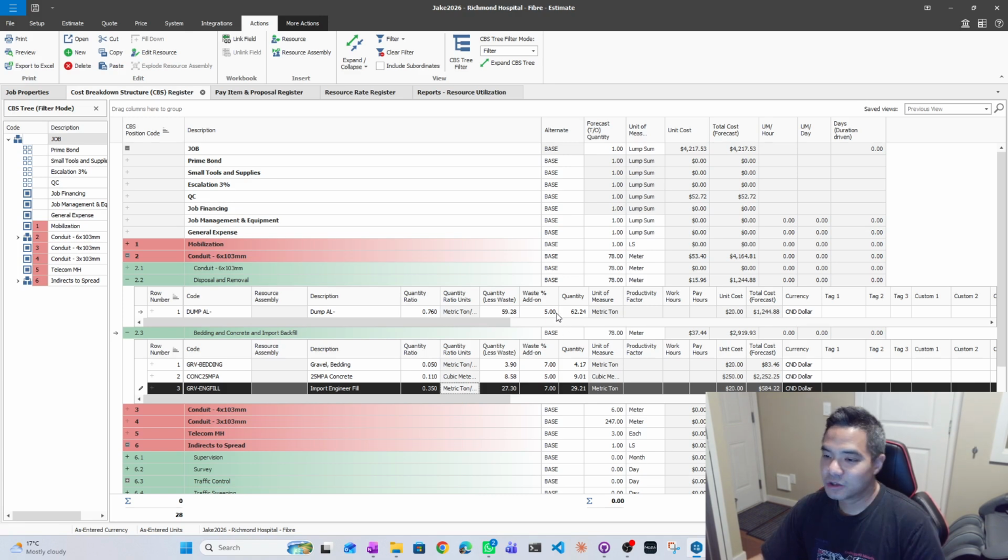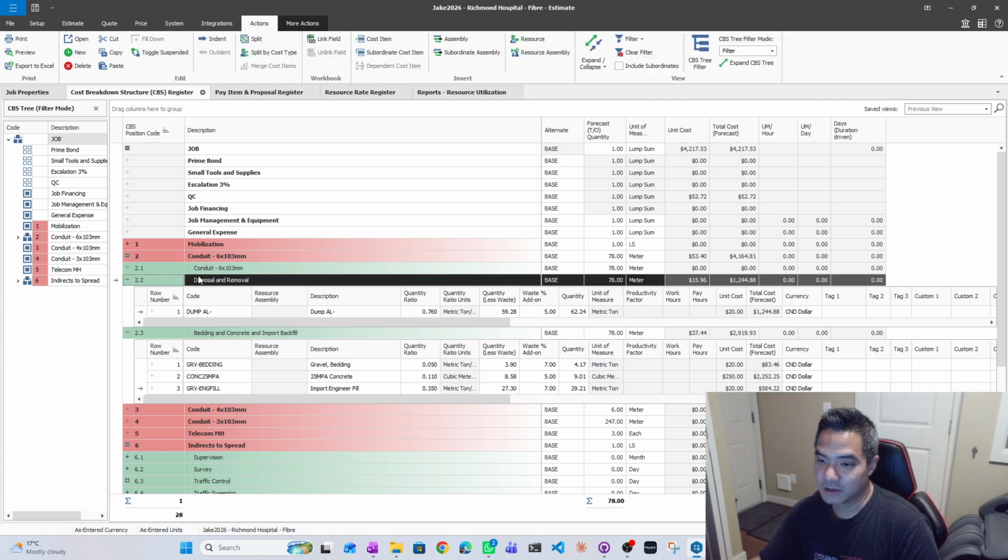In Ineight, it also allows you to add in some waste factors. You could technically do this volume and then add in your waste factor to calculate that ratio as well, but that's just lazy. When you do this, it does that for this trench. So then all of a sudden you have the correct quantities for each trench.